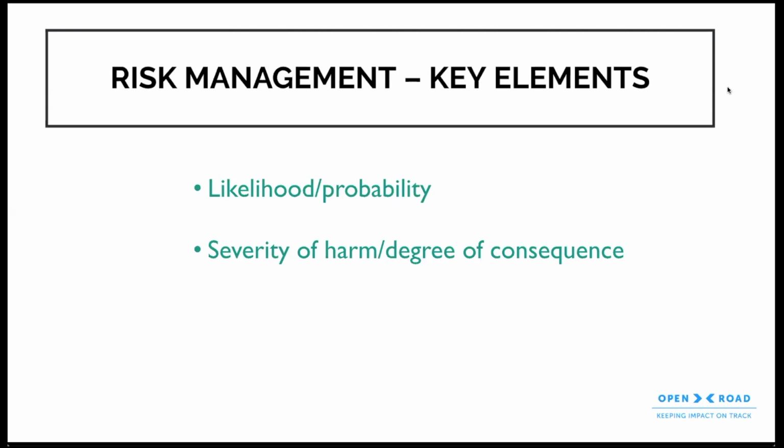And in risk management, there are two additional elements that we also need to be aware of. And that is influence and control, and predictability. So let's not confuse probability with predictability. Probability, right, is the likelihood that there is a change in the presidential administration and that is going to have some kind of effect. The probability of that change happening is one thing. Being able to predict whether or not that change actually will happen is something separate.